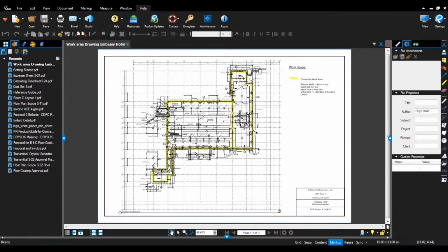And that's the way I use it on a regular basis. When I do a time and material project where there's no way of telling how long it's going to take or what it's going to take, I do the daily log, and I send that as a PDF to them every day.